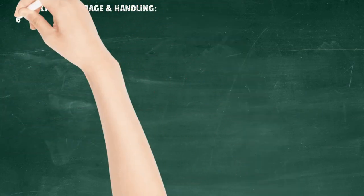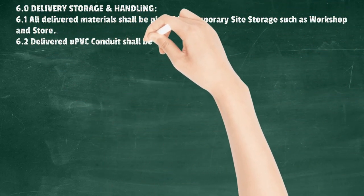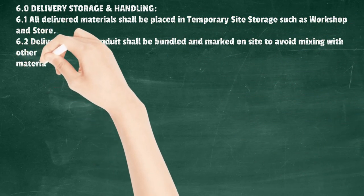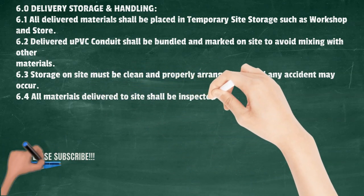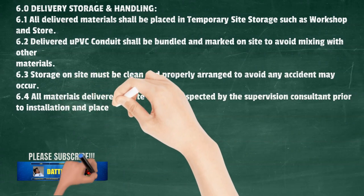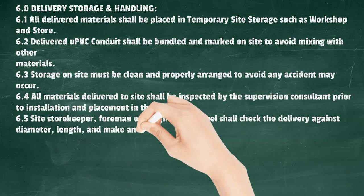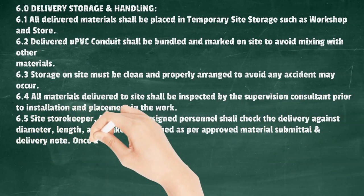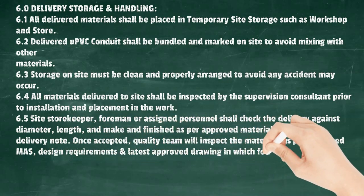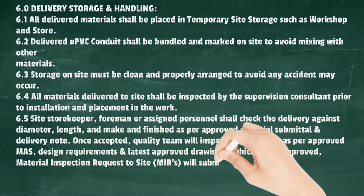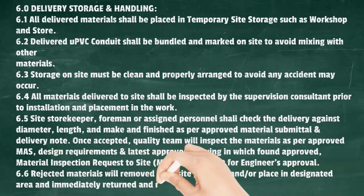Delivery, Storage and Handling: All delivered materials shall be placed in temporary site storage such as a workshop and store. Delivered UPVC conduits shall be bundled and marked on site to avoid mixing with other materials. Storage on site must be clean and properly arranged. All materials delivered to site shall be inspected by the supervision consultant prior to installation. The storekeeper, foreman, or assigned personnel shall check delivery against diameter, length, make and finish as per approved material submittal and delivery note. Once accepted, the quality team will inspect materials and submit an approved material inspection request for engineer approval. Rejected materials shall be removed from site and returned or replaced by the supplier.